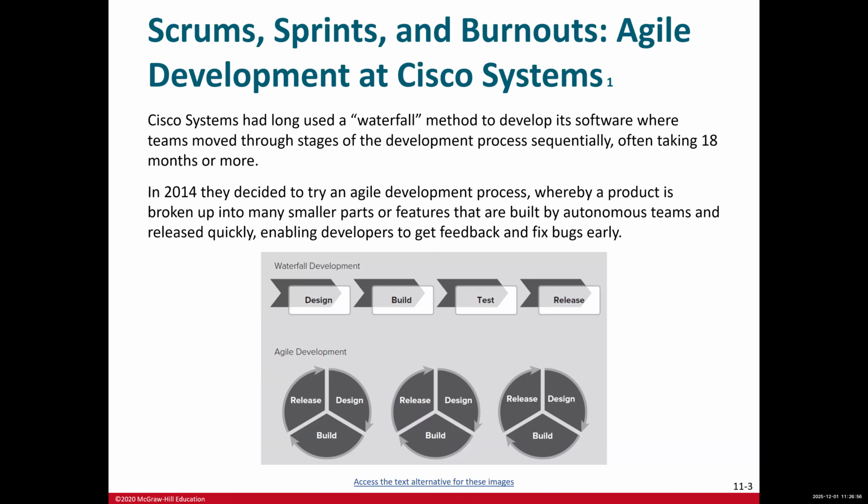Usually we start with planning. We just want to plan what we're going to do, and then design, and then start coding. After coding is done, we start testing the software, and then deployment. It's a very well-defined sequence of steps for the waterfall approach. Usually the waterfall approach is very linear, and each stage of the development process should be completed before we move on to the next one.